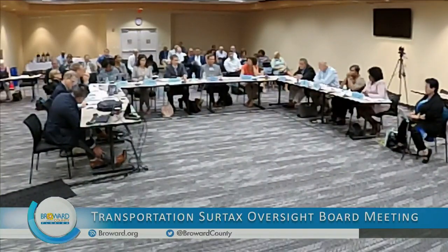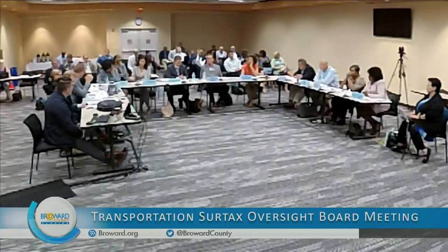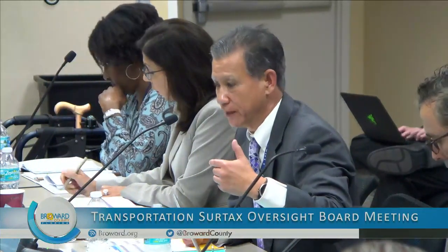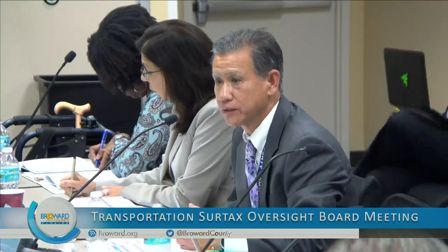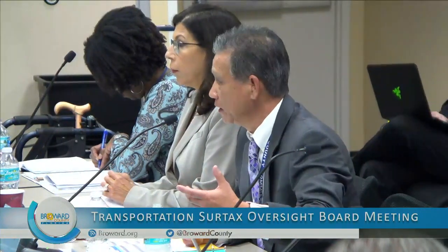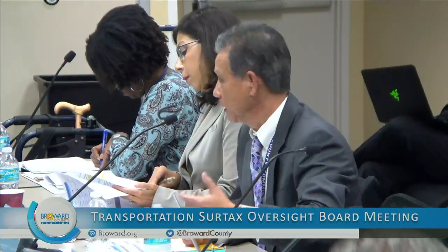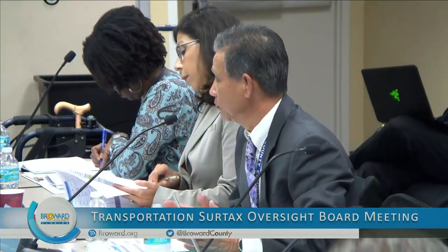Yeah, in all of these projects that we have, we'll be working with our small business divisions in terms of establishing, identifying, and complying with the goals that we have for each one of the projects. Each one of the projects will be done on an individual basis. They will be evaluated by our small business office on an individual basis, and as in all county projects, they will have language in the actual procurement that will obligate either the consultants or the contractors to comply with the goals and requirements so that we can spread the work out among our community.